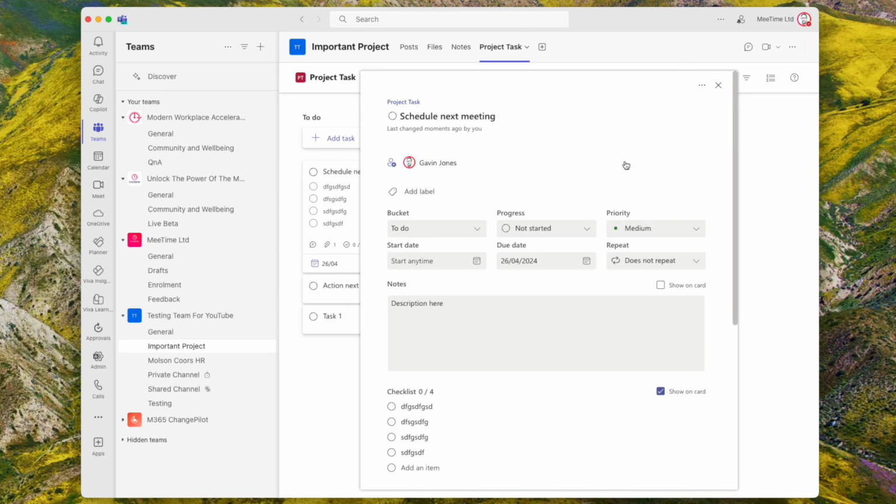If you want to do that in Planner, you create one task, put this in your forecast, assign it to somebody, and then copy it 50 times and assign it 50 times, which might be a bit of a pain, but that's what you can do in the free version of Planner. Say free, the version of Planner that's included in your Microsoft license.